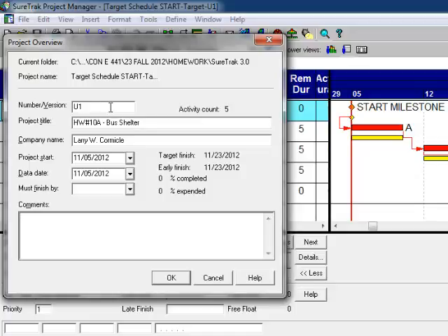On the ABE building next door, Ben Bungie with the White's company, they have a company-wide file naming standard for every BIM model on the entire job, so they can figure out which version is by which author on what date. Or with all these models flying around that are uploaded to a box.com account, they don't know which version they're looking at. And they've created a file naming structure just so you know which version from the plumber, the mechanical, the electrician, and the sprinkler fitter you're looking at.